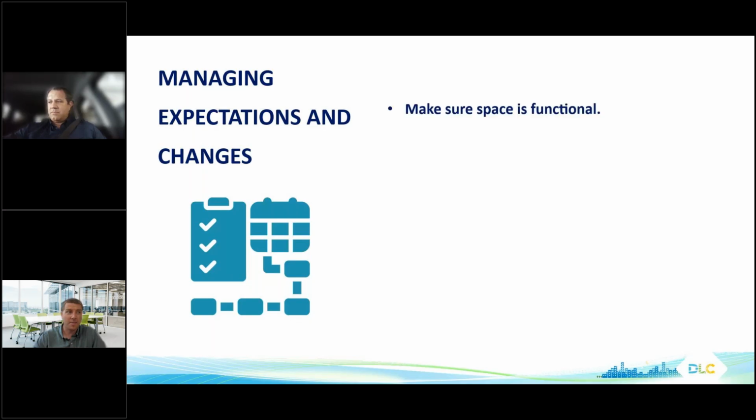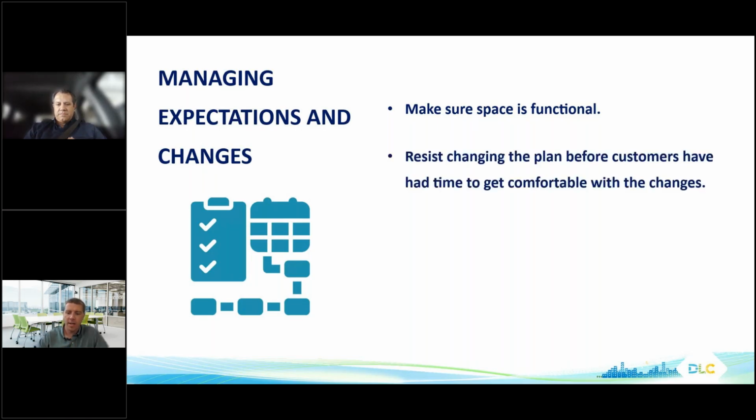And that's different for every space, but just make sure it works. I would strongly recommend you resist changing the plan before customers have had some time to get comfortable with the changes. Tell them, hey, this will work for you. It'll work great. It's going to be different because you're used to switches and now you've got sensors. Give us 2 weeks and then let's see. Then let's tweak it from there.